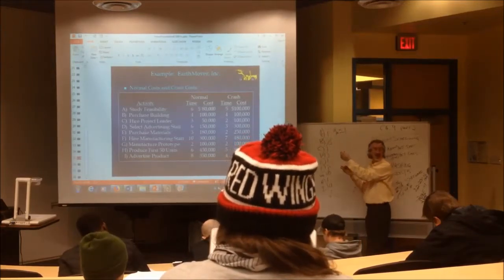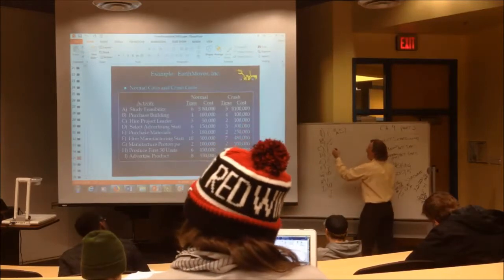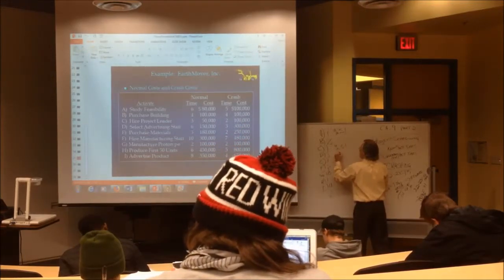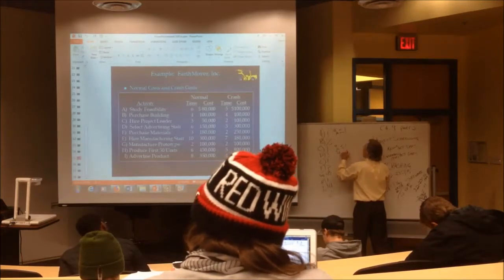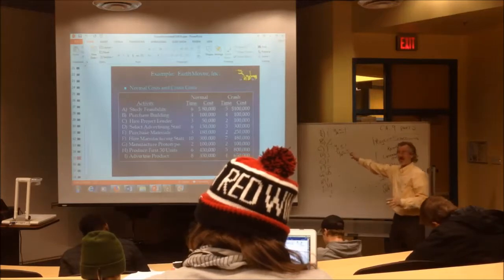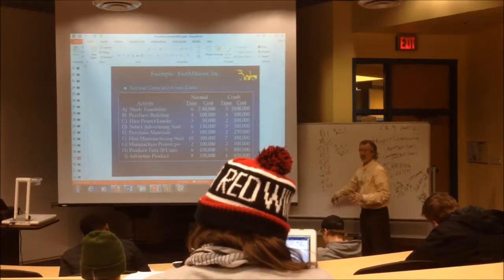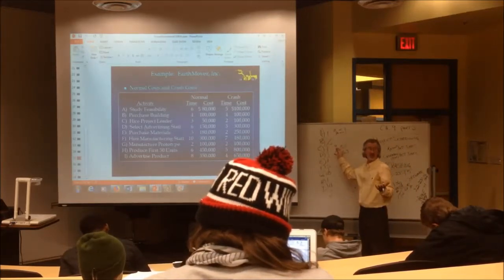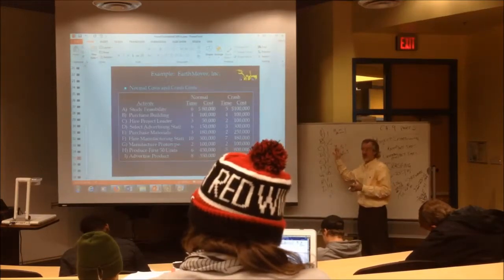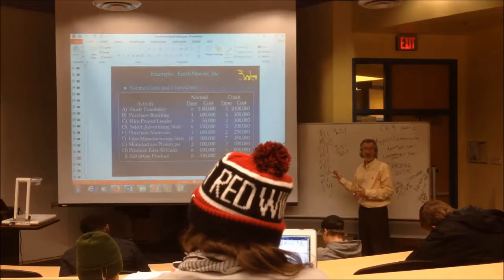But if you had to write it, it would be Y sub B less than or equal to 0, Y sub C less than or equal to 1, Y sub D less than or equal to 3, and so on. By finding that difference, and that's not the only reason you did this, it's just a shortcut to write those Y constraints. But what you did this for is the next column.